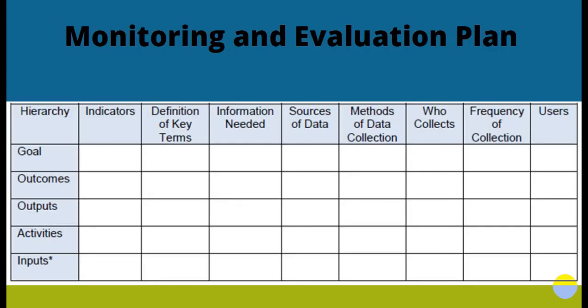Here's a sample monitoring and evaluation plan. You can see it looks very similar in format to the logical framework matrix, with some additional columns showing additional components of detail relating to our indicators. And one additional row: inputs. Along with measuring activities, outputs, outcomes, and the goal, we might also want to measure inputs — such as man hours, dollars spent, material used, etc.